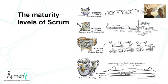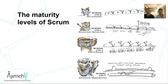Scrum Level 1 is not waterfall anymore, but not real Scrum yet. We're doing sprints and at the end producing something that looks like a potentially shippable product — but you can't ship it because you've created a lot of technical debt. So after a couple of sprints you have to stop and focus on hardening — bug hunting, stabilization, regression. Sometimes you're calling it Scrum but you're doing Scrum without shipping, without a Scrum Master involved, without retrospectives.